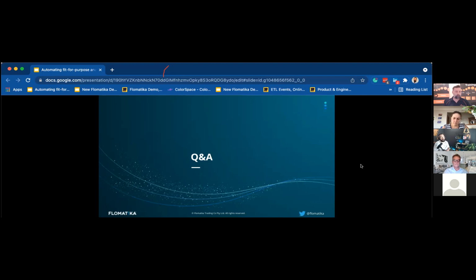Yeah, and also like ready for peer review or ready for test. Most of the queues, if you understand which are your key sources of delay, then you can start asking how might we questions. And if the value stream of the service comes together in a service delivery review, for instance, or in an operations review on a much larger scale, they can start asking how much questions: how much can we reduce or eliminate that waiting for peer review, waiting for code review step.